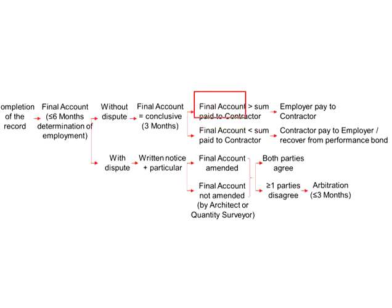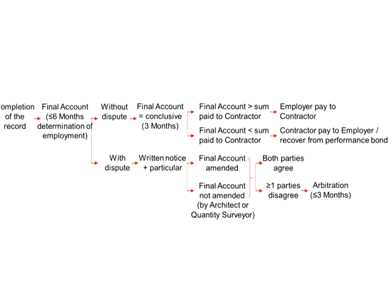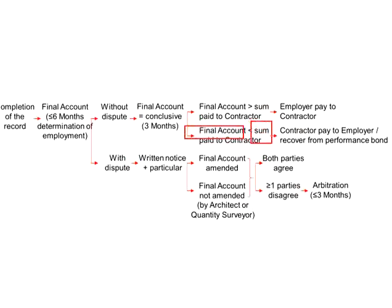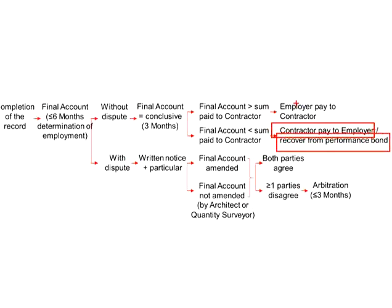It is either the final account is greater than the sum paid to the contractor, or it is less than the sum paid to the contractor. If the final account is more than the sum paid, the employer still owes money to the contractor and will need to pay the balance. If the final account is less than the sum paid, the contractor will have to pay back to the employer, or the employer can recover the sum from the performance bond.